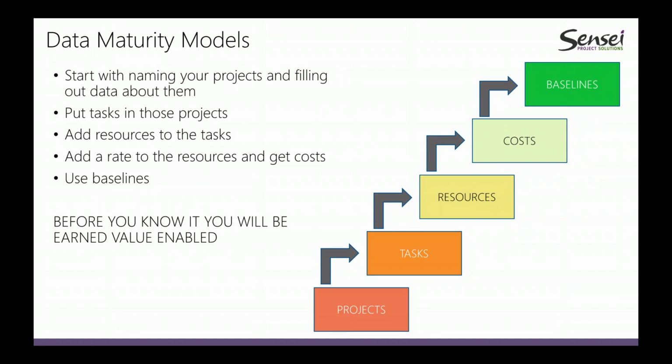And this is typically where a project management system like Project Online, Microsoft PPM, project and portfolio management, has the concept of enterprise resources. And those allow you to publish your project to the Project Online instance and aggregate that information. So instead of having a John Smith, a J Smith, a Smith J, and a John, multiple local resources that are all the same people, but the system isn't able to aggregate them.